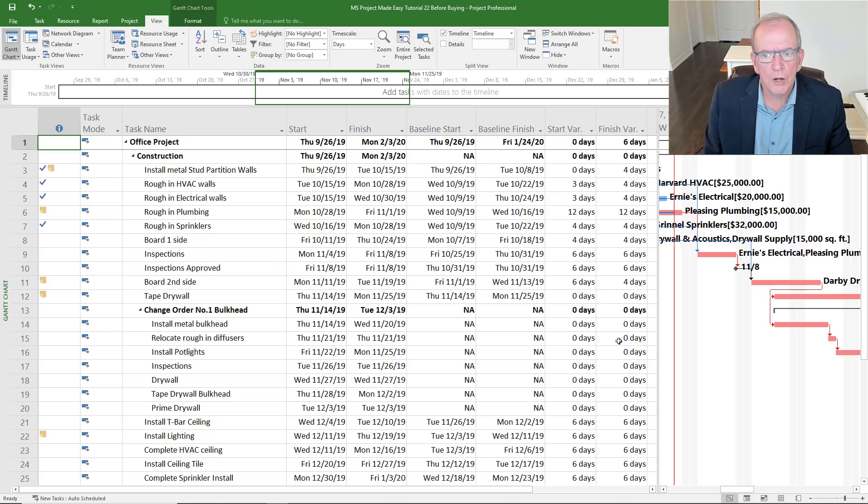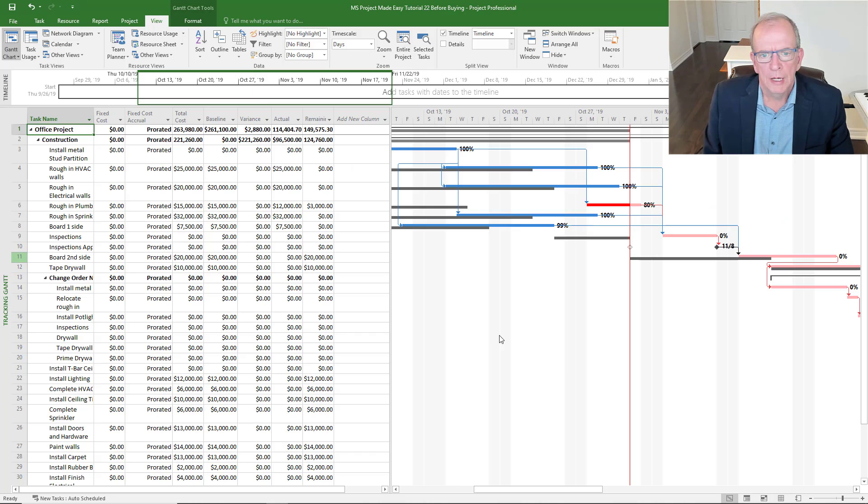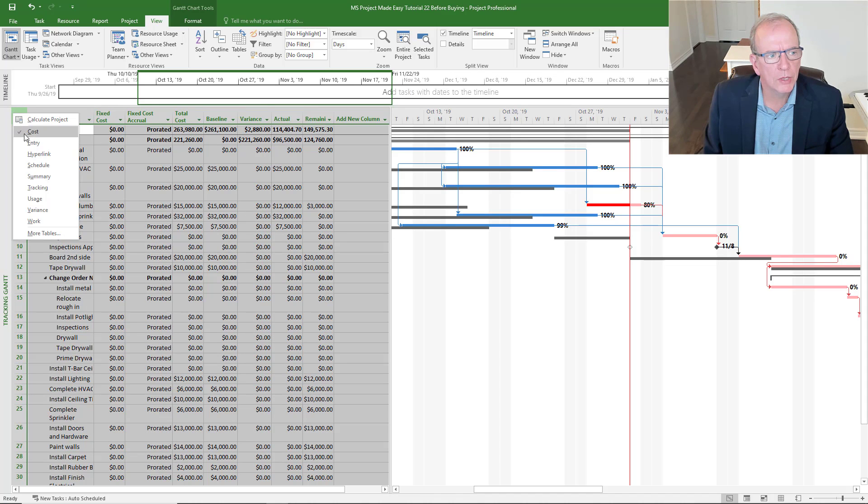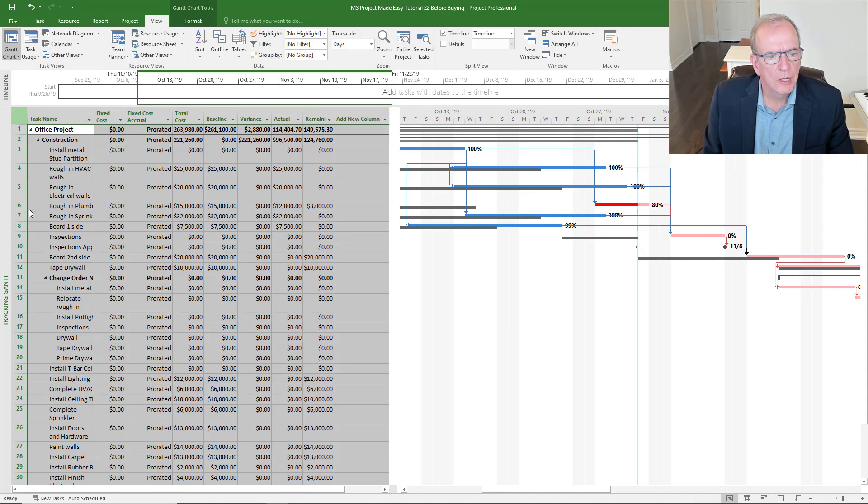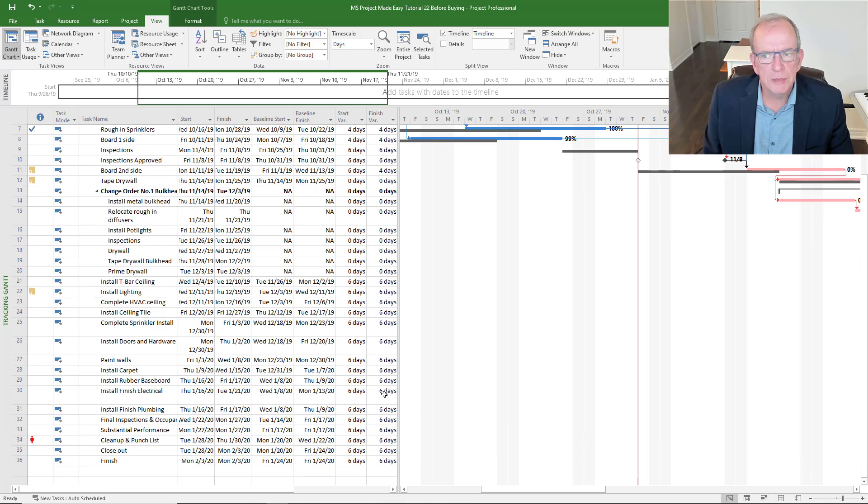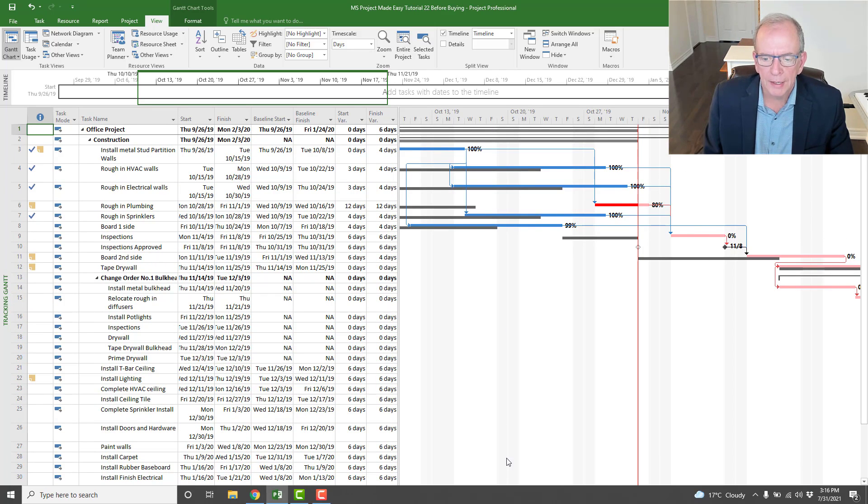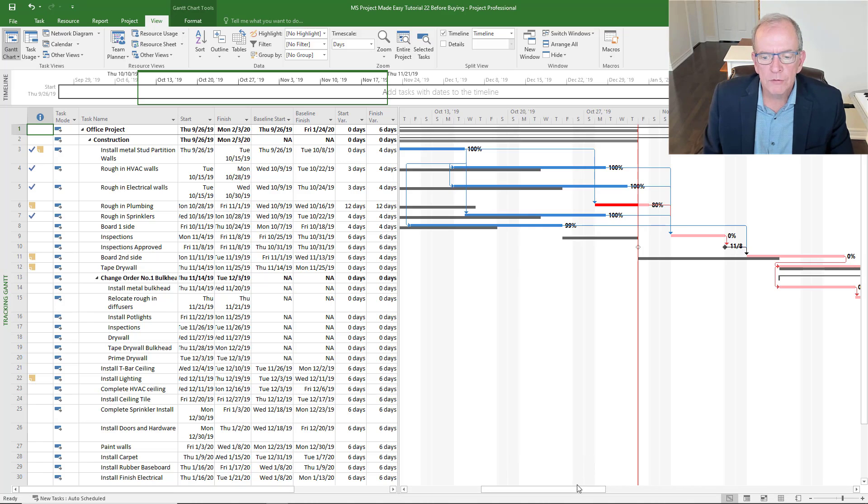It can accomplish a lot of things for you. Not only that, when you look at the tracking Gantt and you want to see how are we doing - oh, we're behind schedule. How much are we behind schedule? As I mentioned, we're six days behind schedule.